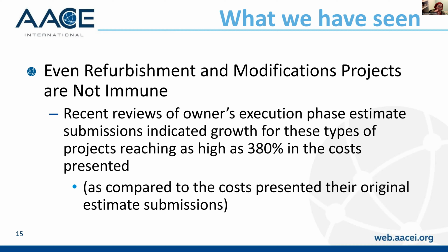As we move through each gate and we better define our deliverables, we are basically right-sizing the composition of costs within the box, as it were. What is base, what is contingency, what is EU? But sometimes we're comparing it gate over gate, and that's not a true reflection of what cost growth looks like over the life cycle of the project.